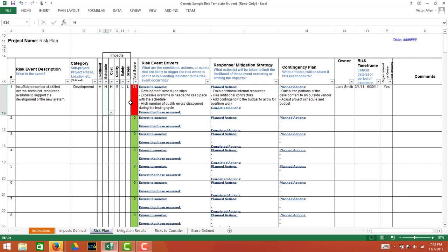You could fill up your tank the night before. However, what if somebody siphoned it out overnight? Or what if you had a leak in your tank, you didn't realize it, and it all leaked out? So there are lots of different things where you think you're eliminating the risk, but in fact you're not. You're just mitigating it. So the only way to truly eliminate a risk or avoid it is often just to remove it from scope, not do something.